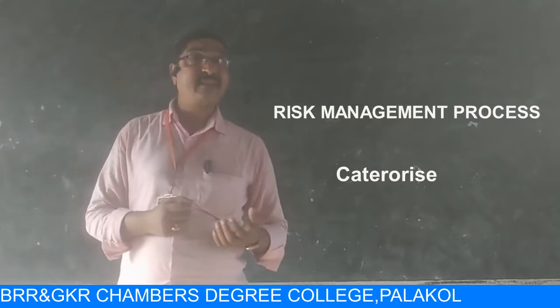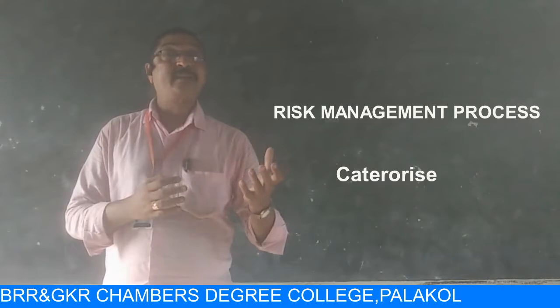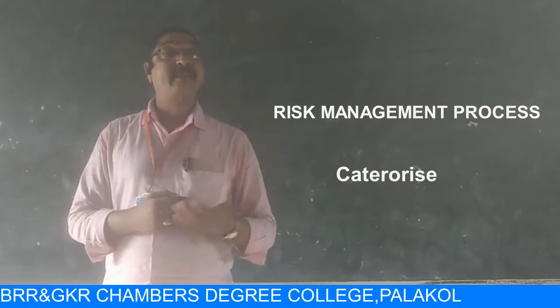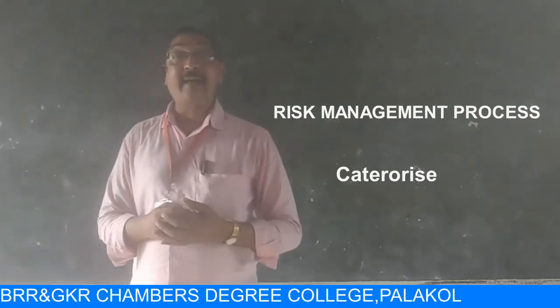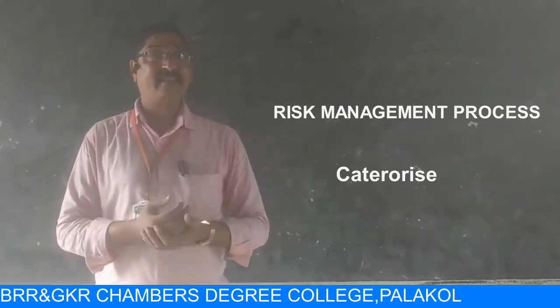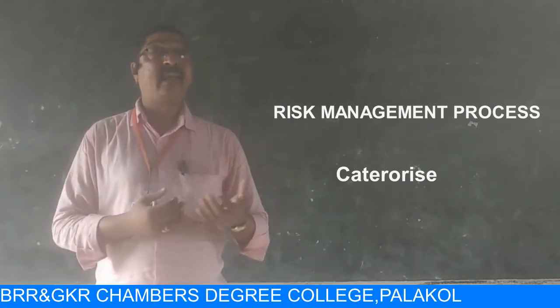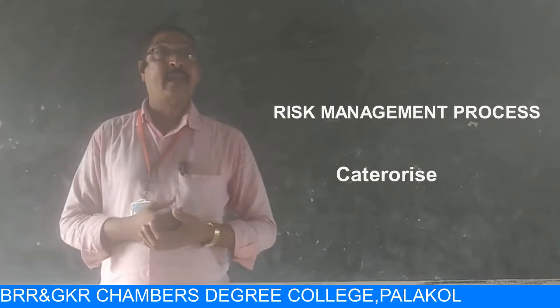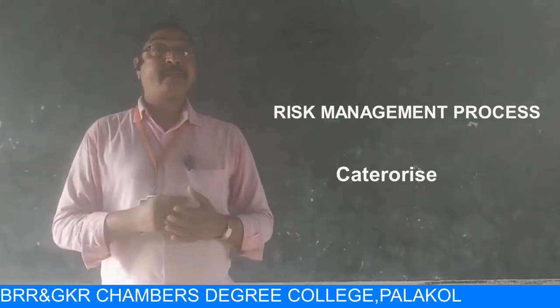If the impact of risk is very high, if the risk arises, the project may be affected very much, then that risk must be categorized as high risk. If the impact is very less, then the risk will be categorized as low risk. Like that, all the identified risks must be categorized.